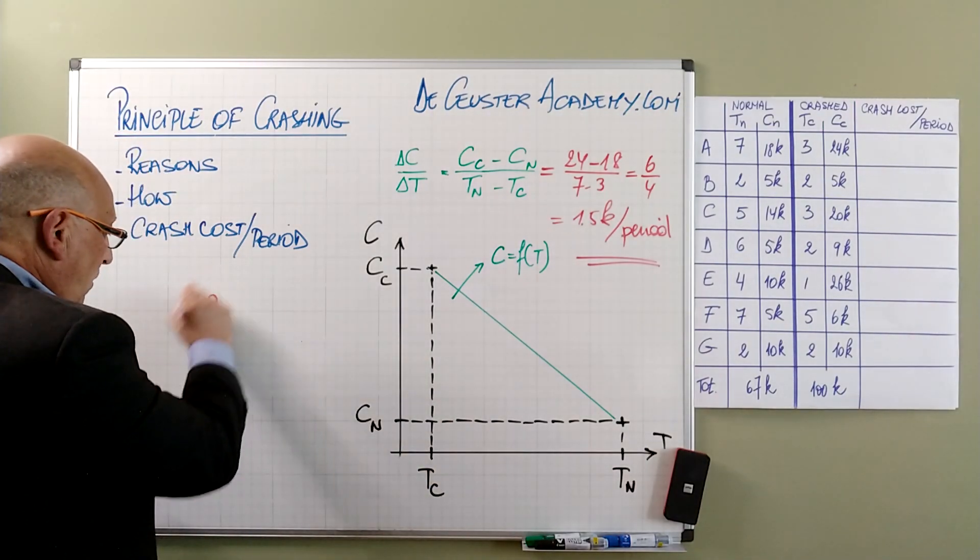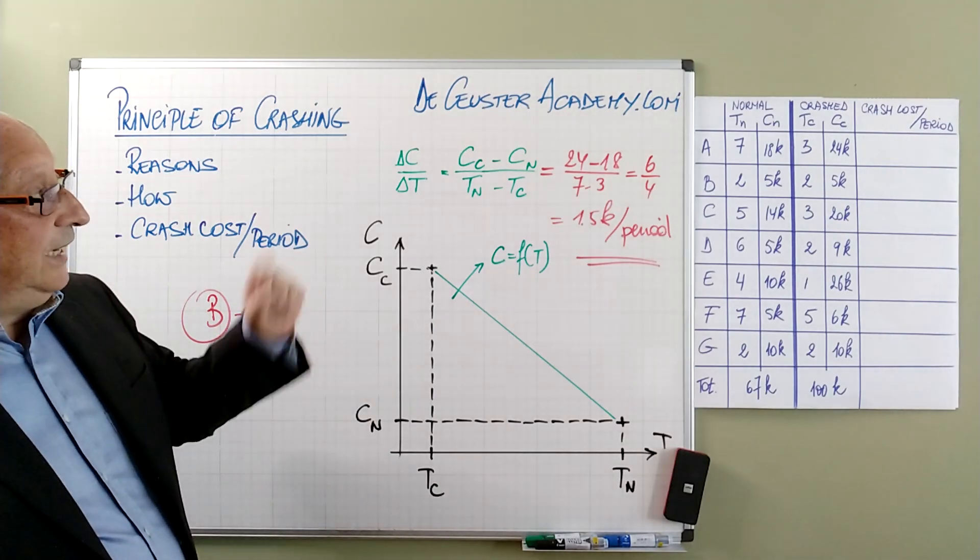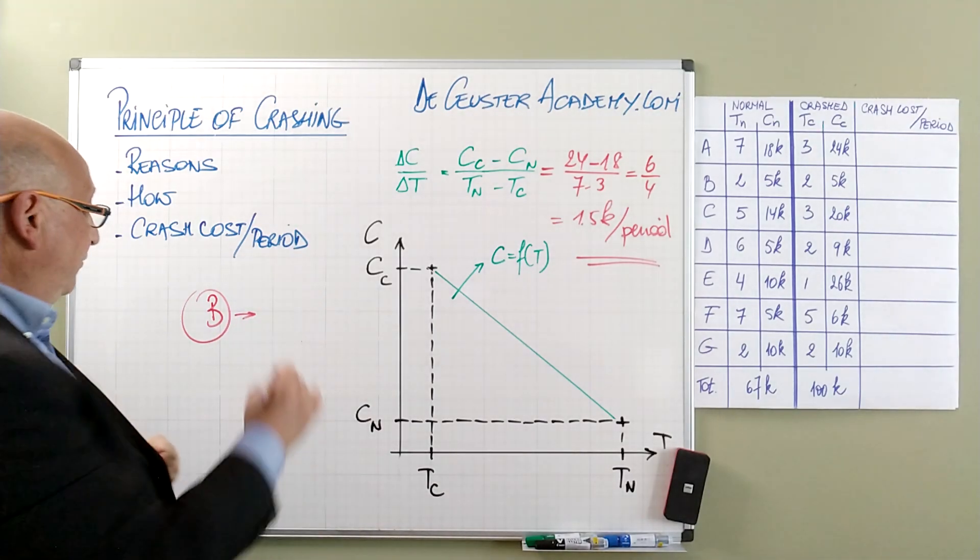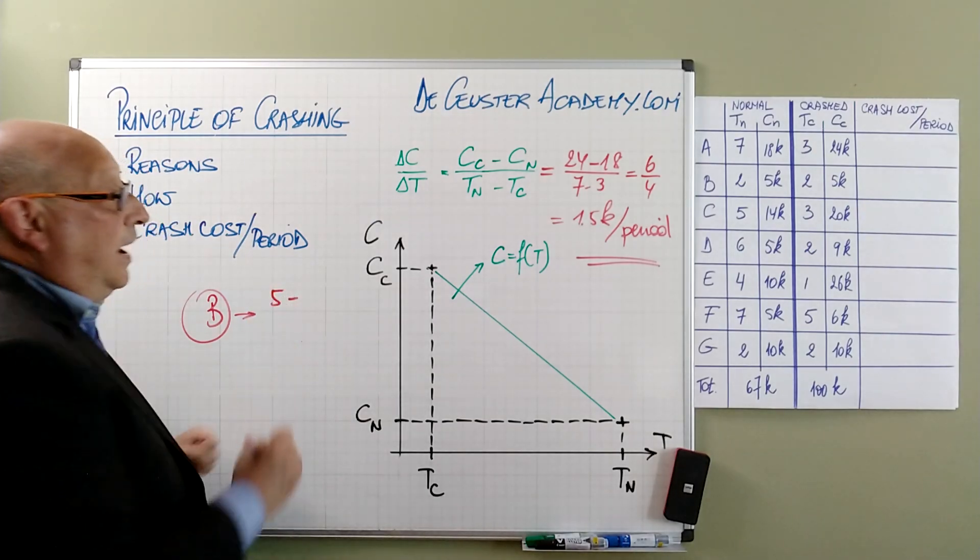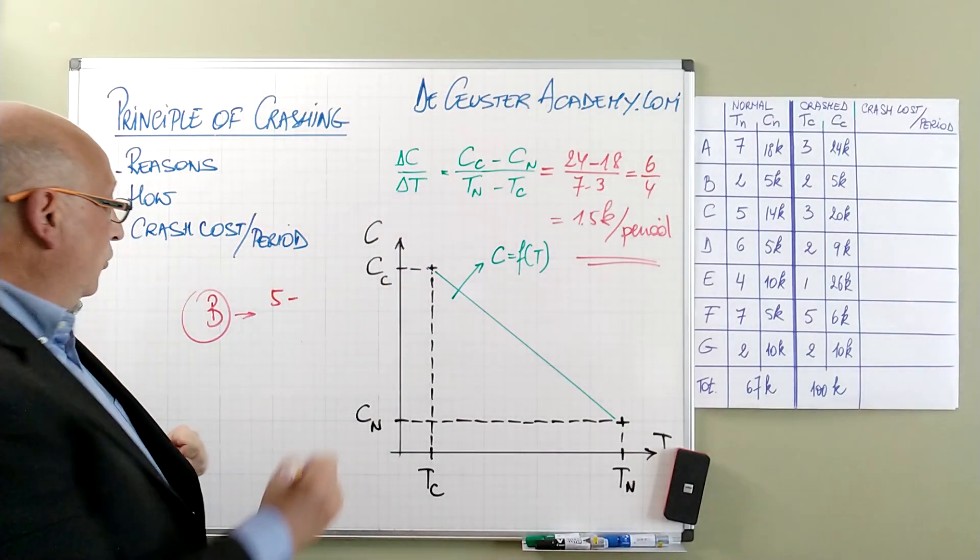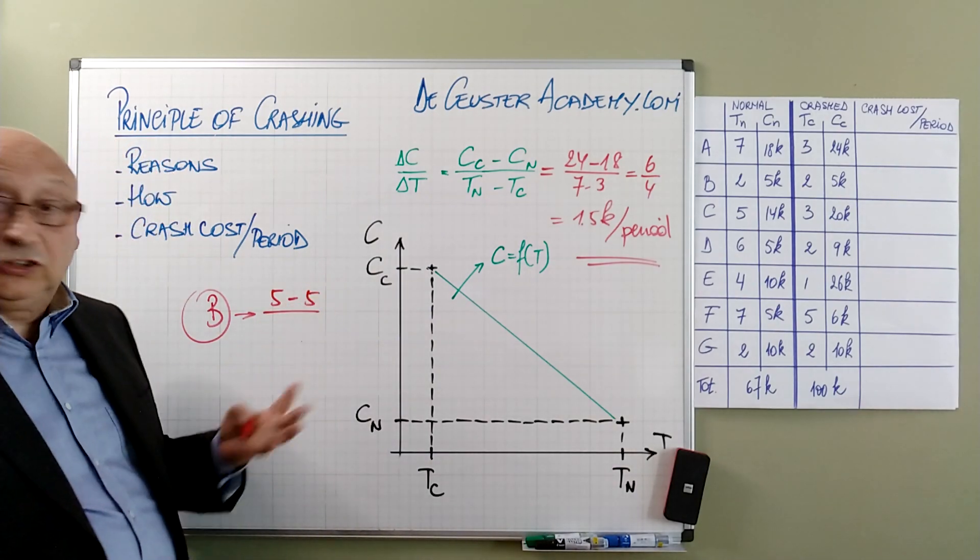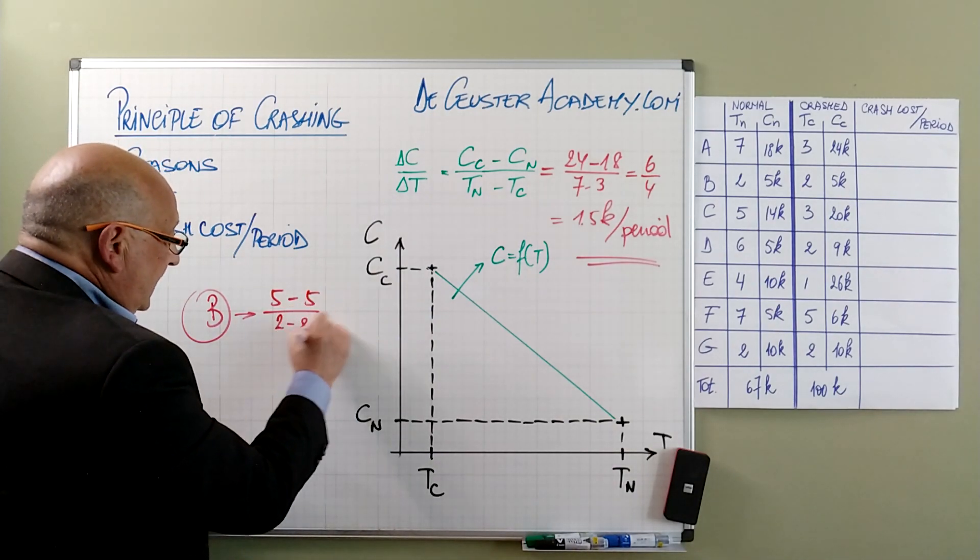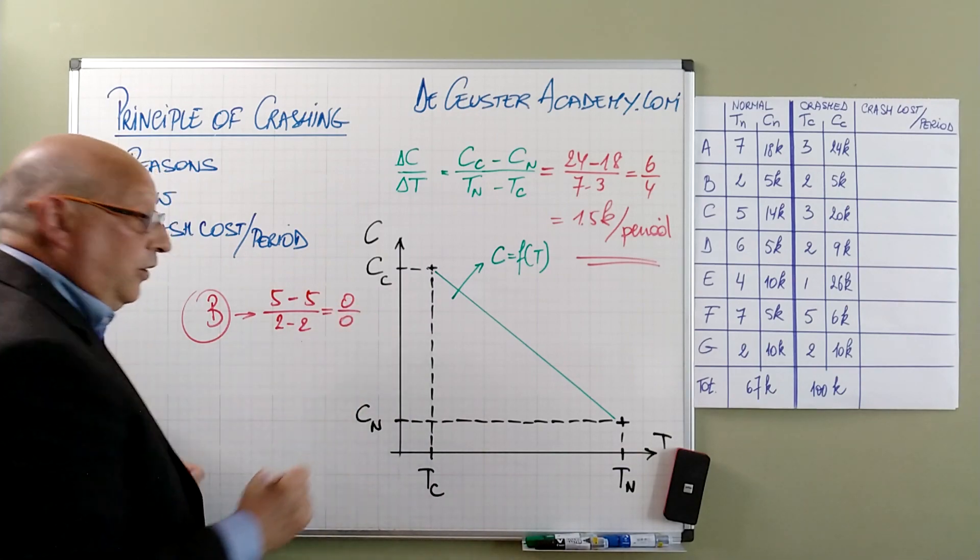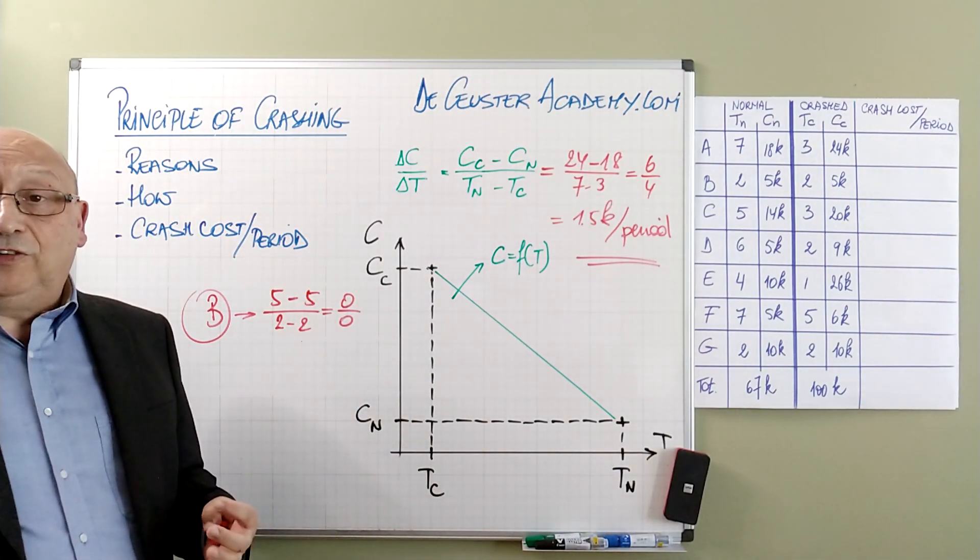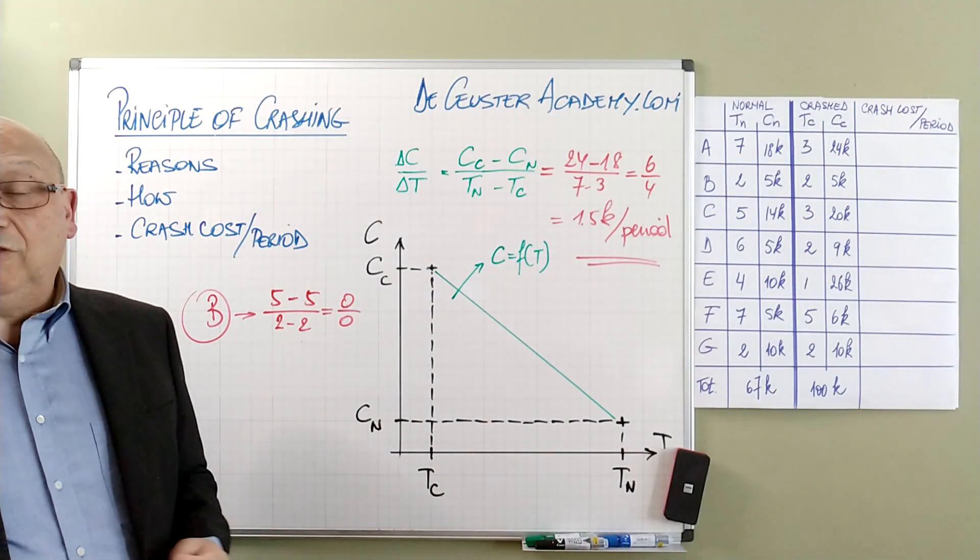Activity B, here we have the crash cost is 5 minus 5 for the normal cost divided by the time difference, 2 minus 2, which is in fact 0 over 0.